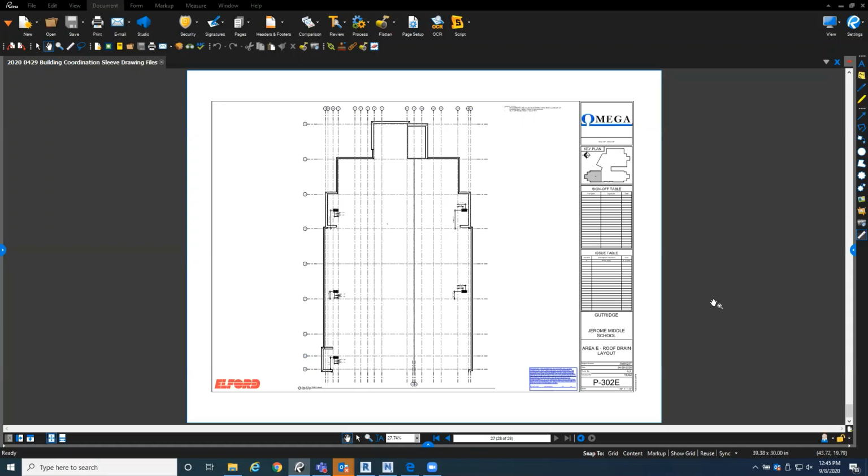And unfortunately, as we all know, during construction, there's constant adjustments to things. And yes, the consultants are always refining the design and therefore changing how things actually look from, let's say, the official CDs to instructional bulletins or supplemental information and so on. So that's the biggest problem we're seeing over here, is that the models cannot get locked down 100% before the framers can get in there.